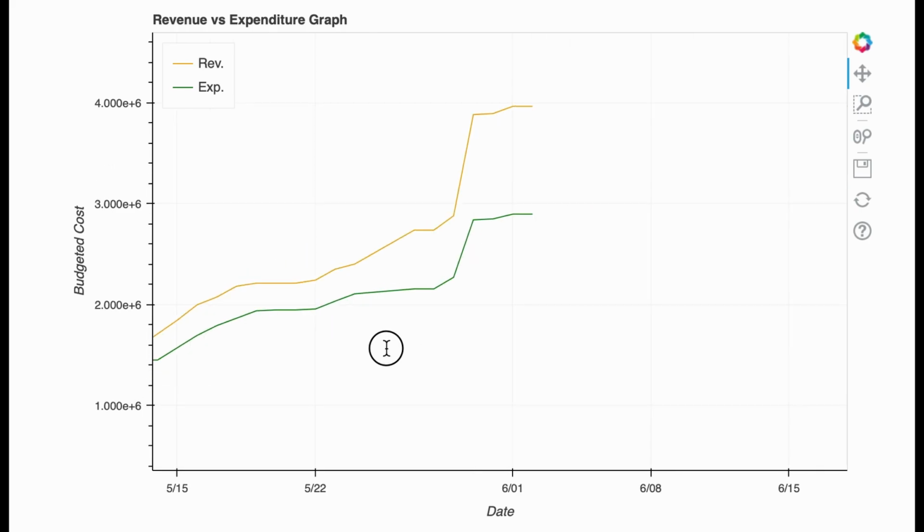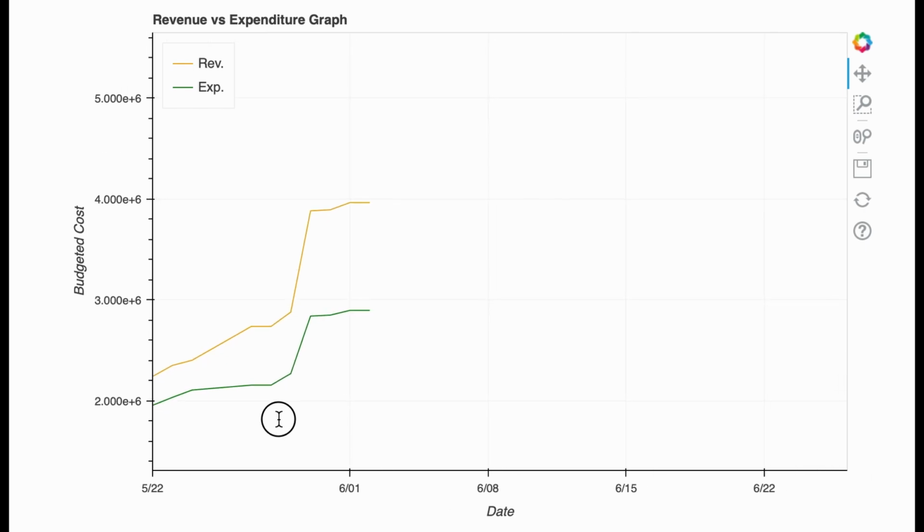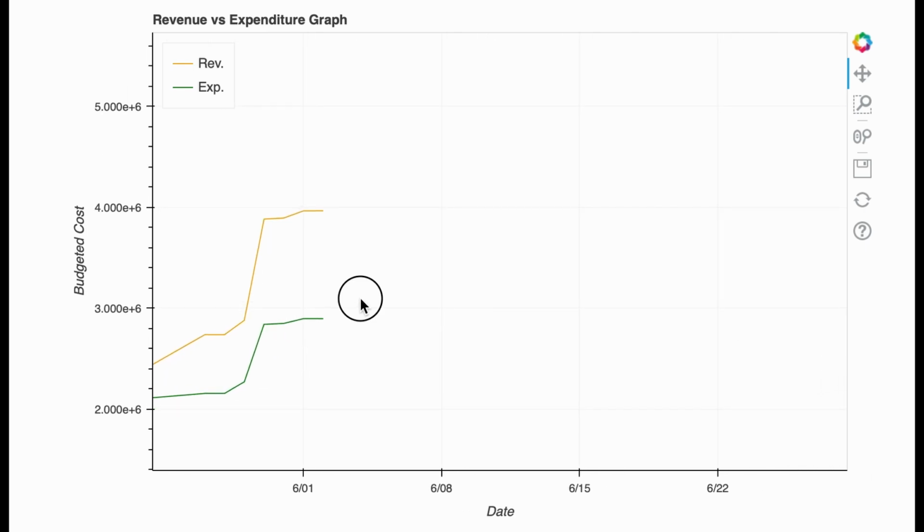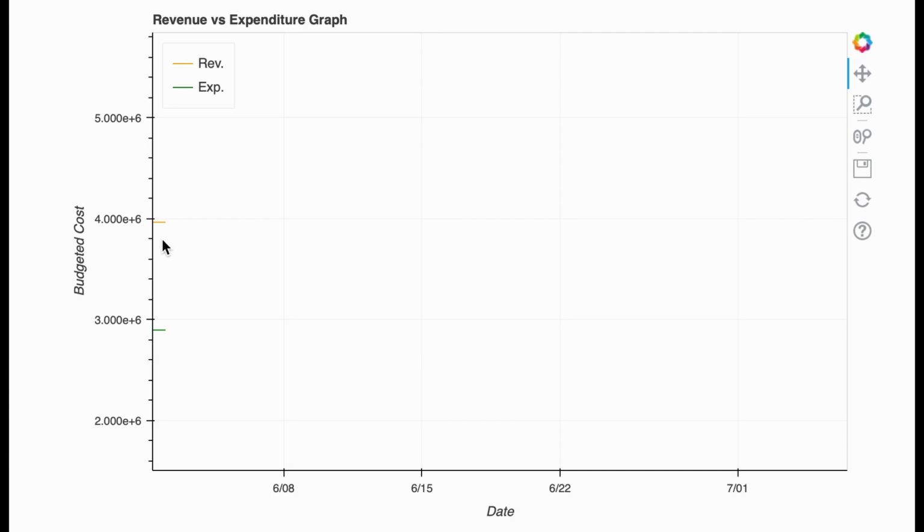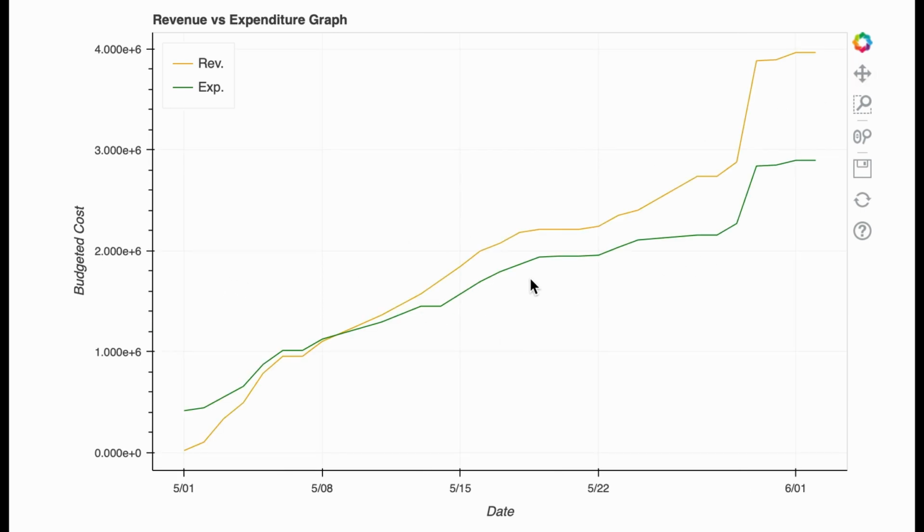1,150,000. And if we also want to look at how much profit we get at the end of this project, we can look at the difference between the revenue and the expenditure, which will give us the amount. The difference is around 1 million for this project. The whole, you can see from this period, after the break-even point, we had a profit phase of the project.